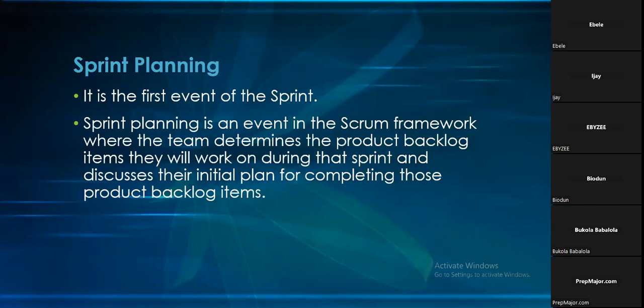So the 4 things that we have picked as a sprint backlog, the moment we agree that we want to work on it, and then we finish working on it, at the end of that sprint, it becomes something of value. It becomes an increment. So an increment is all those product backlog items that changed to a sprint backlog that we have now completed during the sprint, and even the addition of the ones we've completed in the previous sprint becomes an increment.